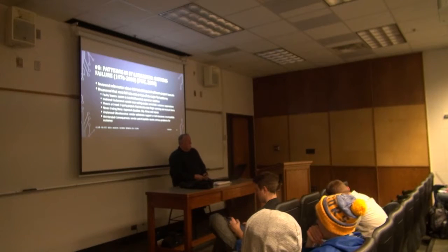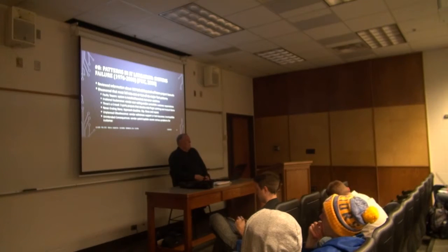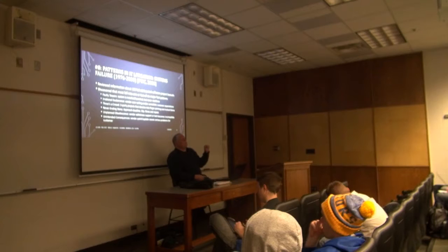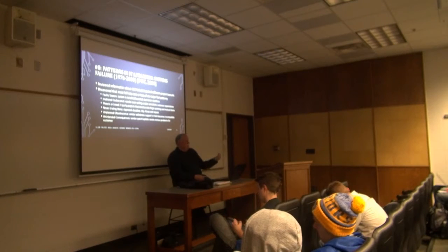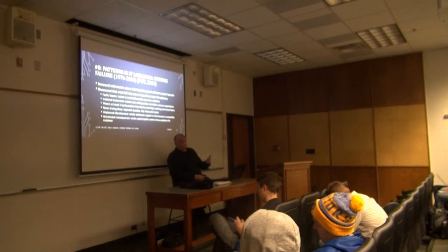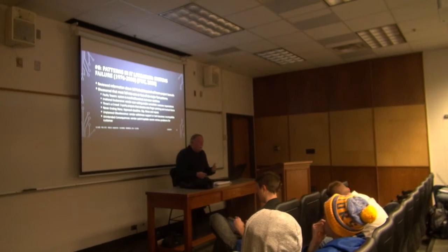Sometimes you have it on the customer side as well, which is the idea, we're going to do an SAP installation, some form of enterprise resource system, and we're going to cut 20% of our workforce as a result and save $20 million a year. And then the SAP project turns out to be late, and it's very interesting if you study statistics on large-scale failed projects. For a lot of people, the failure is that it was seriously late or seriously over budget. But for a large chunk, the failure is we didn't get what we thought we were going to get out of it. We spent $50 million on this ERP installation, and guess what? Our headcount's the same. We don't see the benefit that we were hoping for.